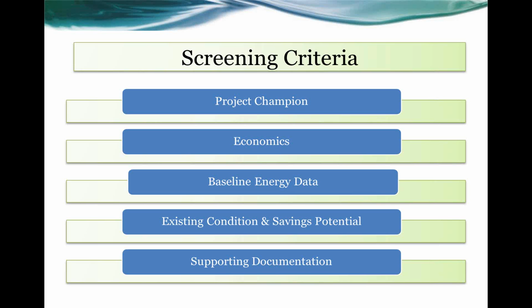Of course, economics. This is a revolving loan fund. We really want to meet that less than 5-year payback, so we can continually replenish the CoFFEE fund each year. So we're really looking for projects under that 5-year payback.